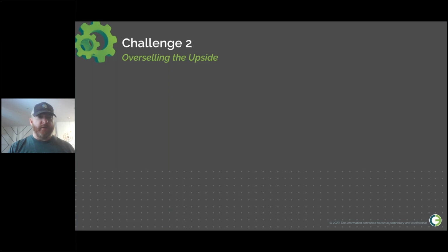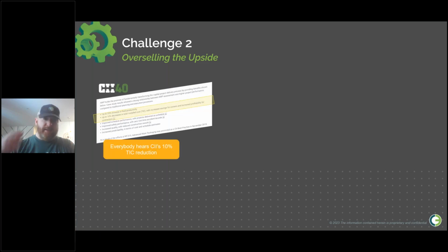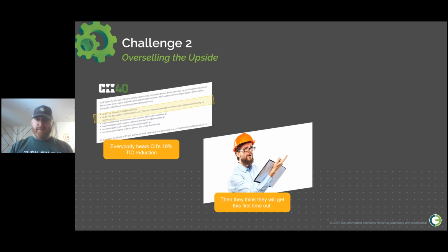Okay, challenge number 2. And this is a big one, overselling the upside. Everybody, when they hear about AWP, focuses on that banner headline that came out from CII. So when they announced AWP as best practice, the headline was, AWP can save you up to 10% of your TIC, 25% of your labor costs, which equates to about 10% of your TIC. The issue is, some people will believe that they will get this the first time out. Immediately as they implement AWP, day one, press play, and I'm going to save 10% of my TIC.